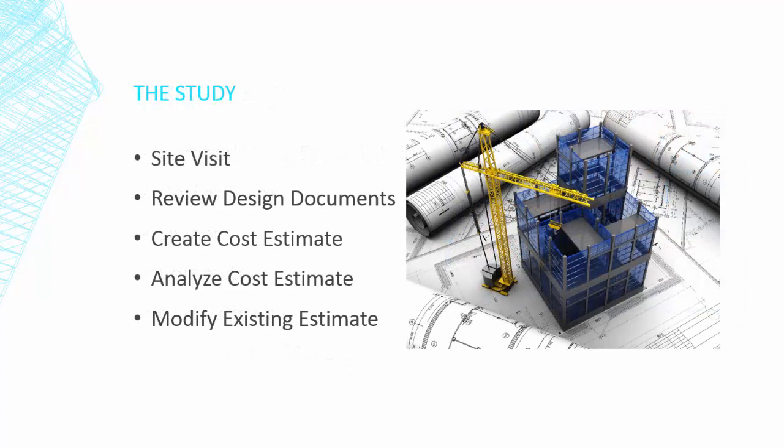Once this team is established, we can start our study or our pre-workshop. Here, we'll do our site visit, review design documents, create a cost estimate if needed, or a modification to an existing one. The objective of this phase is to have a thorough understanding of the project with all of the VE members.